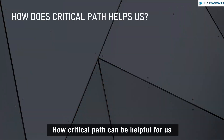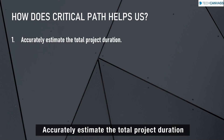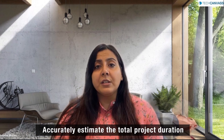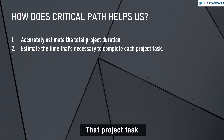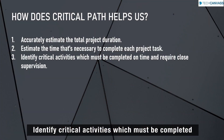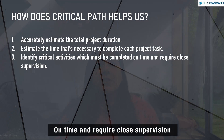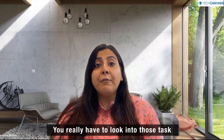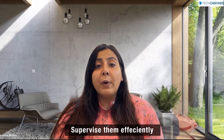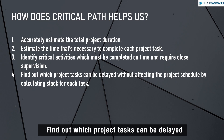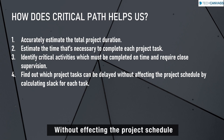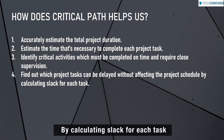Let's see how critical path is going to be helpful for us. First, it is going to accurately estimate the total project duration. Second, it is going to estimate the time necessary to complete each project task. Third, it is going to identify the critical activities which must be completed on time and require close supervision, meaning you really have to look into those tasks closely. Fourth, it is going to find out which project tasks can be delayed without affecting the project schedule by calculating the time for each and every task.